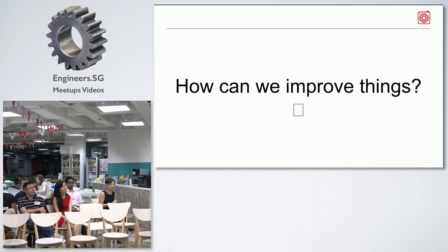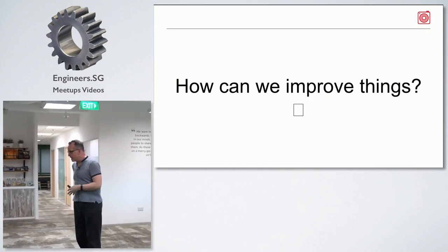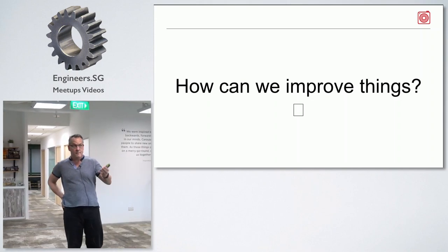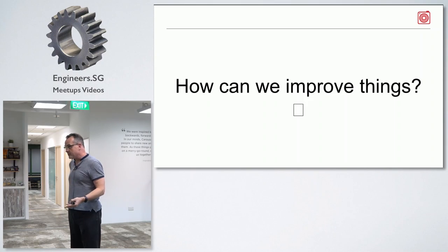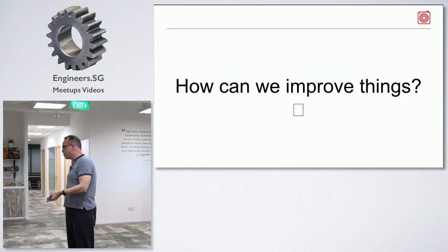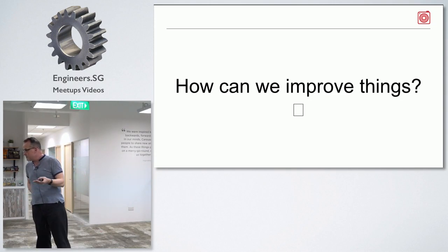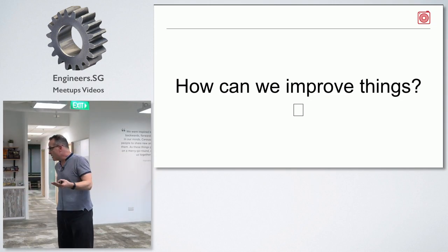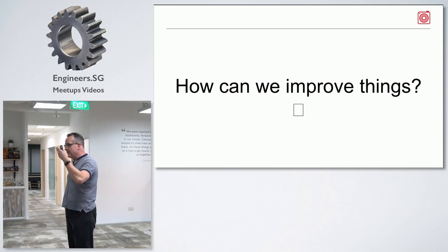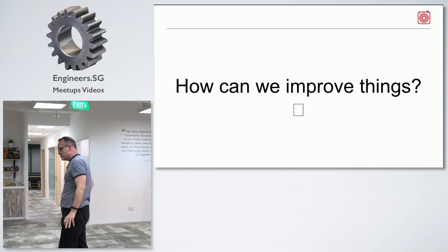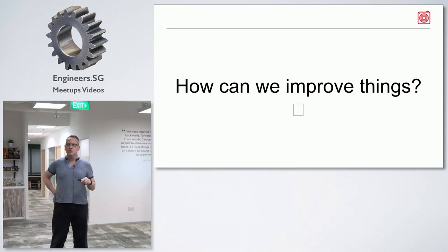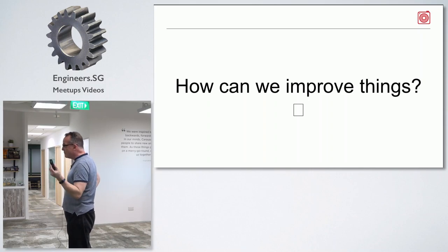So first off, in terms of the sprint and how you did in a sprint, a couple of things you can look at. First is a burn down chart, which is a very simple chart: each day, however many story points you've done, take that off and look at the trend line. Products like Jira make it easy, but you can do it manually. All you need is a piece of graph paper, some markers, and a ruler. It's very doable. In addition, you could start computing the velocity of your team, so how many points from sprint to sprint, and tracking that.